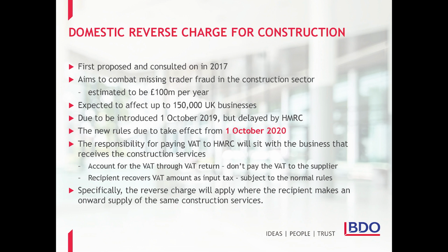The real problem here for the sector actually is a commercial one, in that an awful lot of the construction businesses down the chain will be relying on the VAT to underpin their cash flow. Once this advantage goes, they are going to be very, very tightly constrained for cash, and they're going to find it very, very difficult to deal with that. And if you're not careful, you can end up with a supply chain which is collapsing, and which is obviously in nobody's benefit. So you may want to think about accelerating payments down that supply chain.